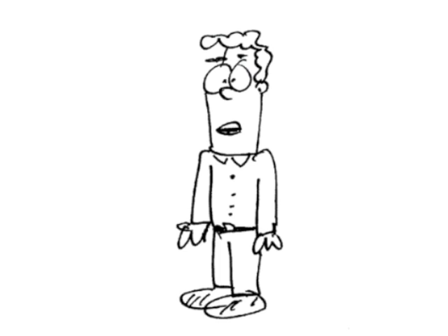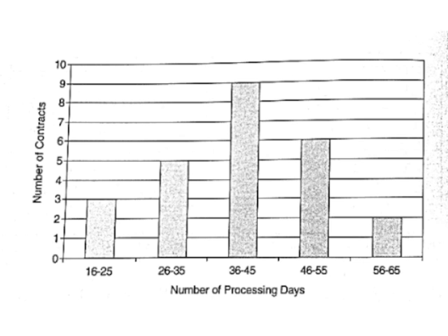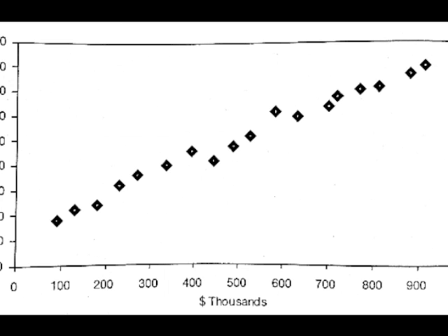Now, task managers will have information they can use for planning. The contracting office will probably receive contract actions within more reasonable time frames, and the contracting office can extend receipt of low dollar value contracts into September because of a short available processing time. All of this is possible because the task manager applies quality tools to understand data and processes: a histogram, a scatter diagram, and a run chart.